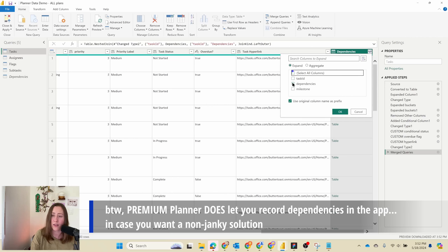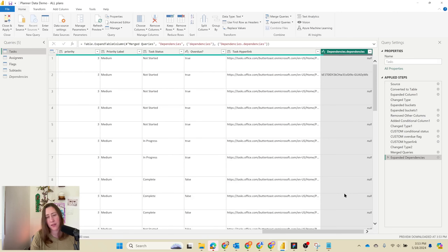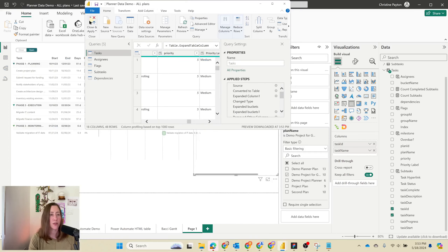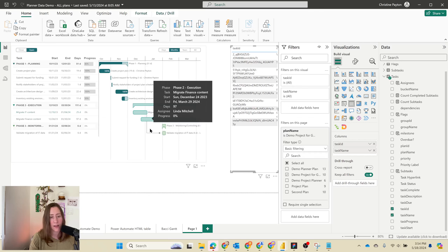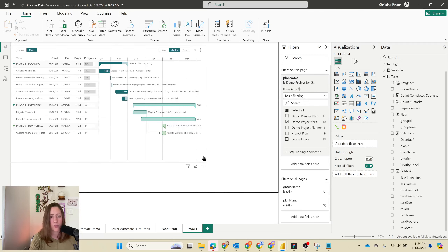This table is in italic font because I've disabled the load on it since I joined it into the tasks table — it actually wants comma-separated values for this visual, and that structure works fine with this table. So go to Merge Queries and merge in the dependencies. I don't recommend manually maintaining your dependencies in a table you type in, by the way — I'm just showing you how I got it in there in case anybody's super desperate. Now expand by clicking the double arrow and expand out the dependencies — milestones too if you've got them. We've got our dependencies column. Let's change the name of that, then close and apply, and drop it into the table. Yes — it worked. This one is now dependent on this one up here, and you can see that when you hover on it, it highlights that line.